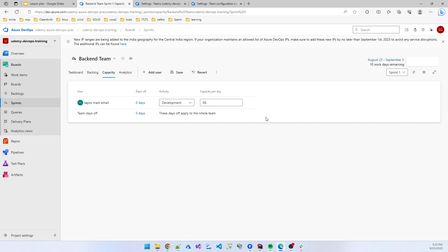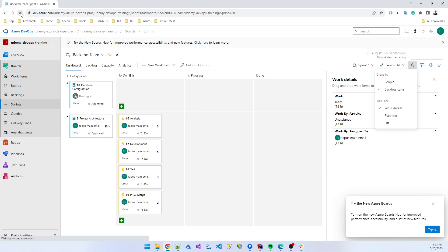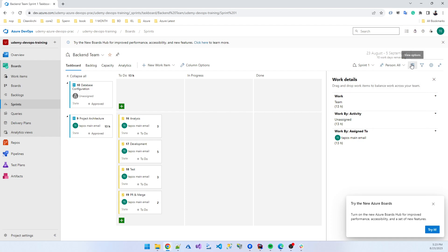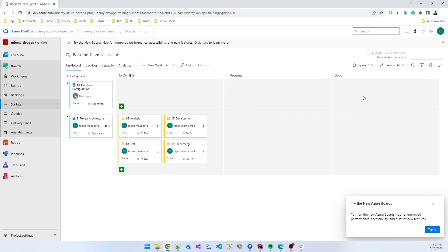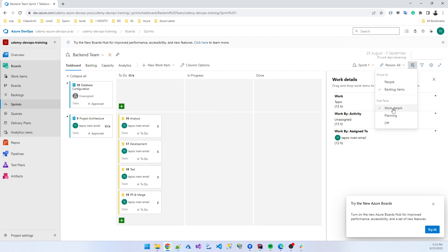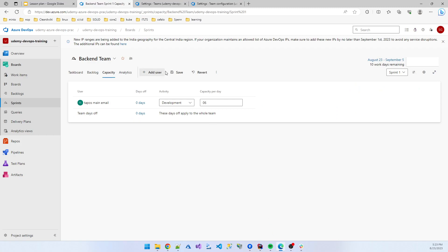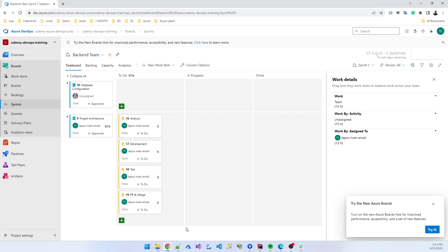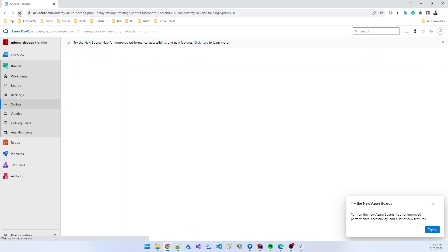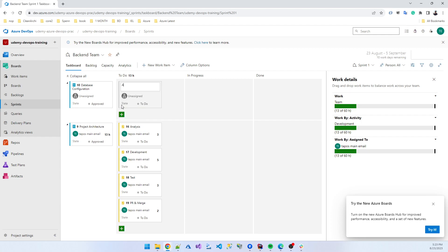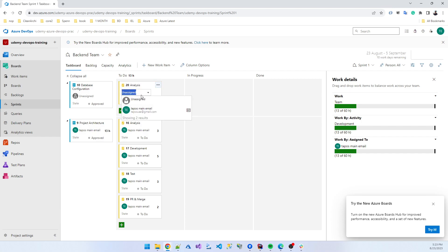Now I set the capacity. If I go to the sprint board again and refresh the page as the developer. I forgot to save the data. So now it's showing, see, in this sprint, the number of working days I have 60 hours to complete all my tasks.